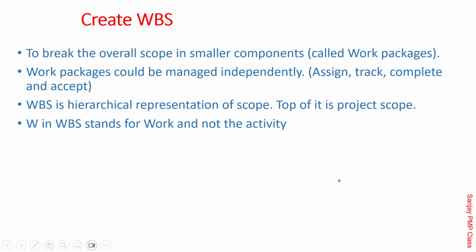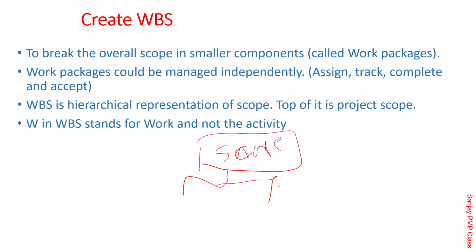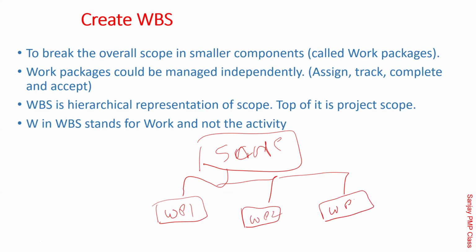So create WBS is to break the overall scope into smaller components called work packages. If this is the whole scope of the project, I am going to break it into multiple work packages: work package 1, work package 2, work package 3, and then I will assign each to one team member, and so on.